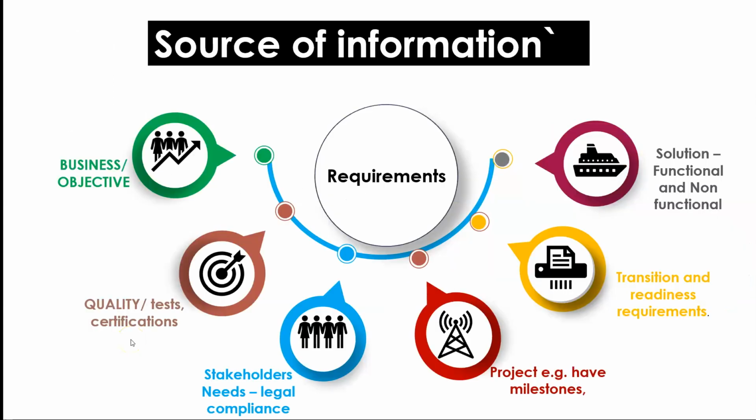I felt it would be useful to talk a little about the types of requirements. For example, one of the very important ones is the business objective. So that the Ministry of Education is building a school. The deliverable of that project will be the building. The objective is to build the school. But the business objective, why the ministry is building the school, is education. So sometimes you can have a project successfully completed, but it does not satisfy the business objective. And so it is a failure.